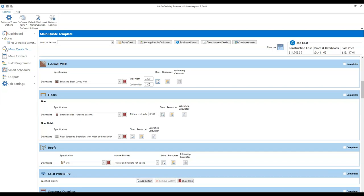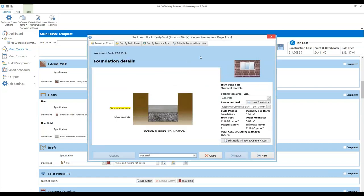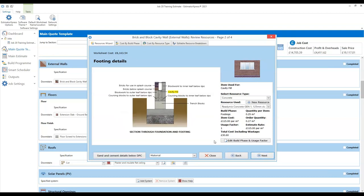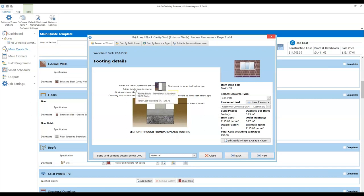You might also want to have a quick review of the resources. The next button along is the resources wizard — if you click where it says resources, we can hold our mouse over any of the items on screen. We've got structural concrete there and it tells us what's been specified. Click next and we can have a look at the footing details — we can see what trench blocks are being used and what the cost of those is. On the next screen we can see the bricks that are being used, where the mini spec you selected appears under bricks above DPC. I selected a 90 pence facing brick — that's what the estimate is using.